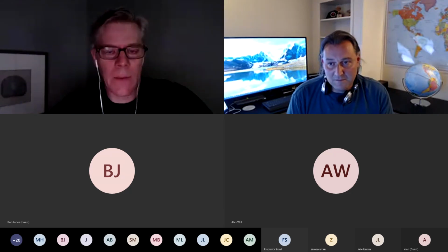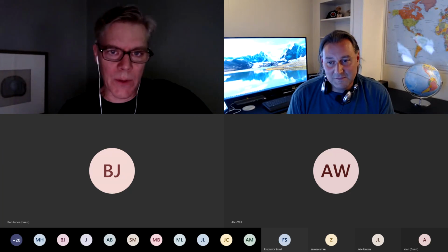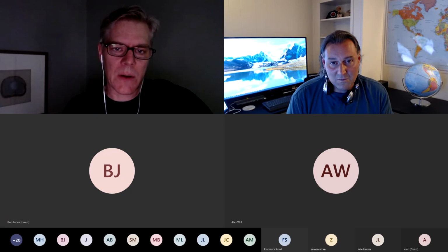And then your salvation to managing scope creep is to say, okay, we could do that. How does that contribute to the stated goal of this project? And if they can make a case for it, then you're going to want to do it. In this example, they won't be able to make a case for it because it's silly. And so you'd say, well, we can't make a case for this contributing to our stated outcome.